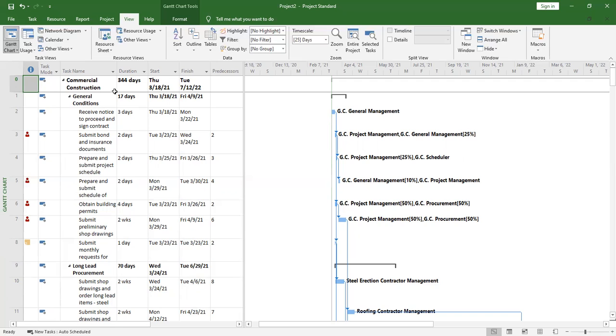Resource leveling is where you want to execute the project without over constraining your resources or even underutilization of them. For example, you may find that one task is being allocated a lot more resources than what is required. Or you may find that one resource has been allocated a number of tasks that it can't handle. Either it will be over-exhausted or it will not be able to accomplish those.